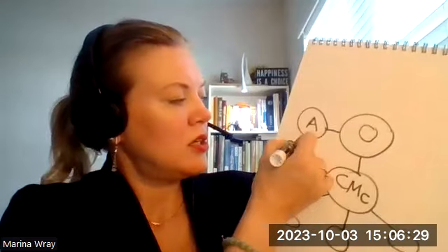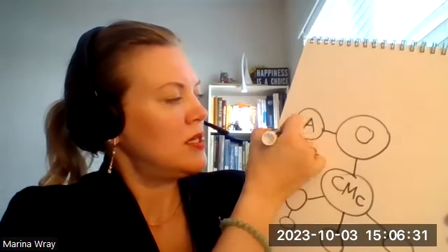And then the architect, of course, has their own guys. So what it does is the construction manager as contractor, or CMC, or CM at risk, they deliver the project. They both advise and they construct the project.